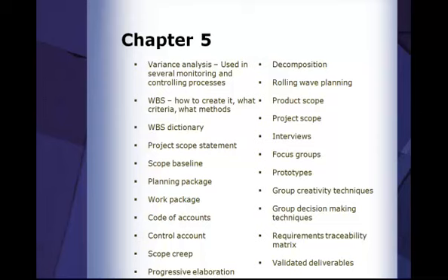Going into the WBS components, know the definitions for planning packages, work packages. What's the difference between both? Which one is higher up than the other? The work package is right at the bottom. Planning package is above that. But you've got the control account level. Under the control account level, you've got the planning package level. Okay? Code of accounts. Understand what it means.